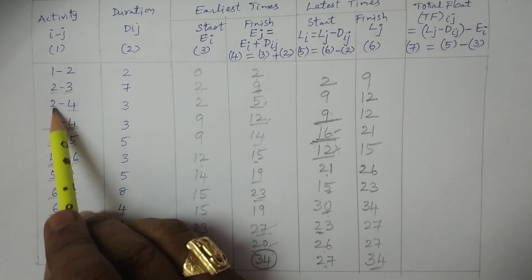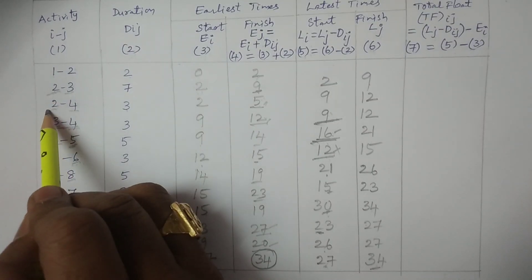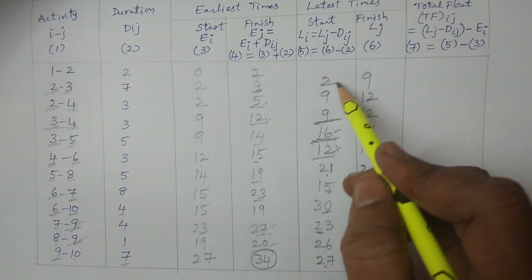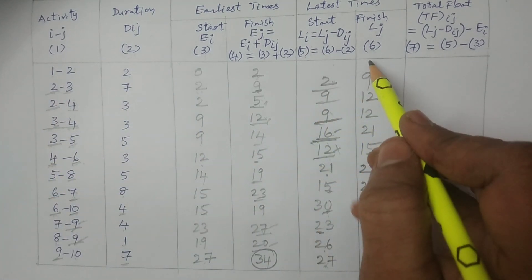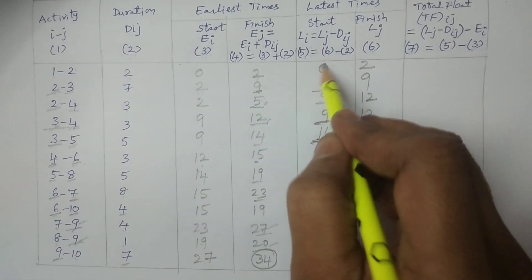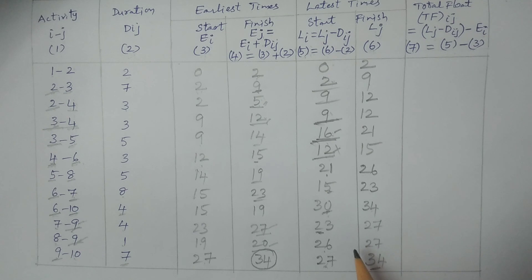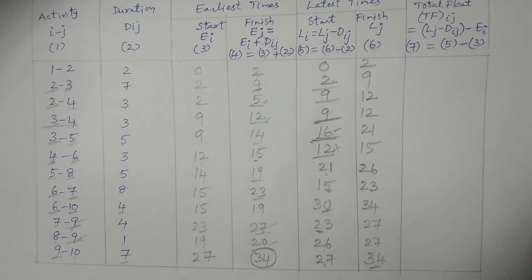For event 2: there are two values — from 2 to 3 giving 2, and from 2 to 4 giving 9. Take the minimum: minimum is 2. 2 minus 2 equals 0. This is the calculation of L values. Calculate Lj first, then Li, using minimum when more than one connection exists.